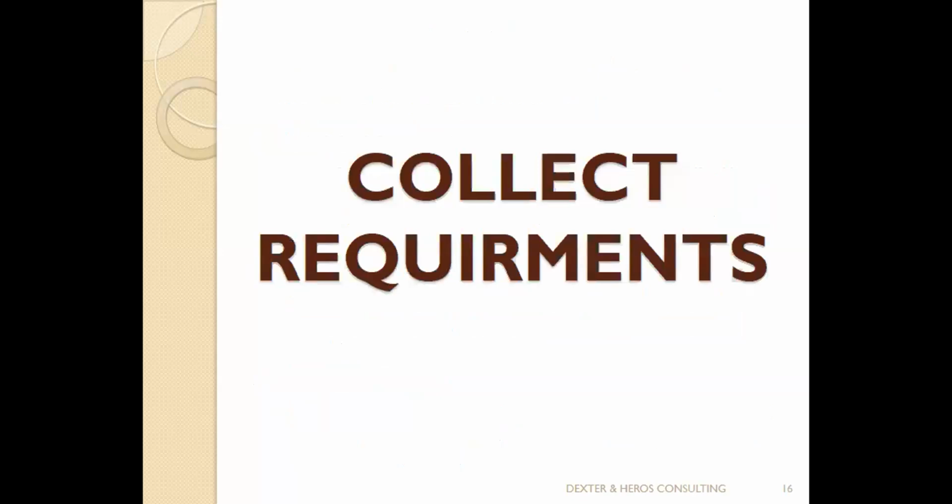First thing, planning. So what I did was to give us a quick overview of the plan. So let's start talking about what is in the plan. What do you plan first? Collect requirements. First step in planning, go meet the sponsor. I know you have the project charter, all correct, no problem. But some of the information in the charter may not be clear to you. Never give a private interpretation to the charter. You are not the one who prepared it.